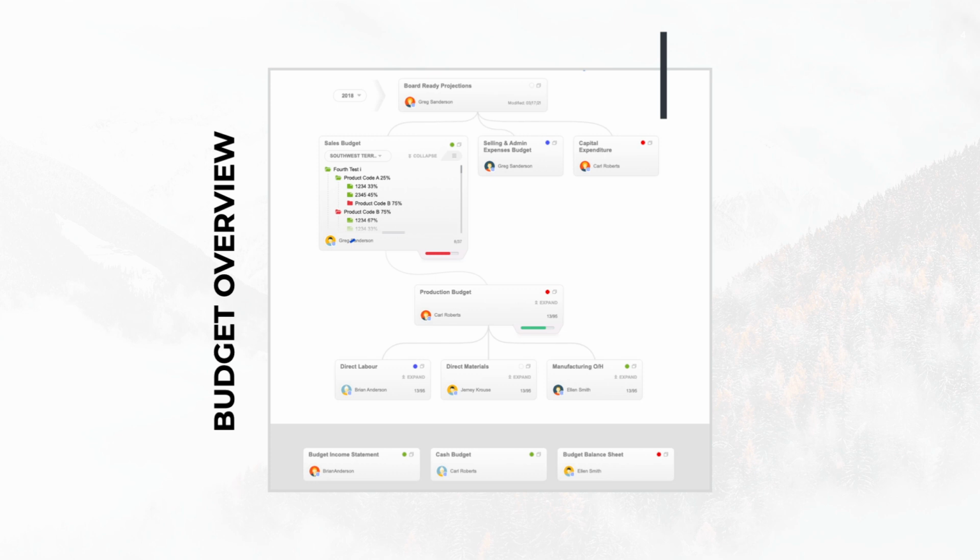The next aim is facilitating change. When you make a change, we automatically generate new budget numbers for you to compare against your current budget numbers for your approval or for your tweaking and approval. That is communicated through the status as well. So once you make a change, something that was green and formally approved gets a red status, meaning that you ought to look into it and then re-recommend it and make that approval.